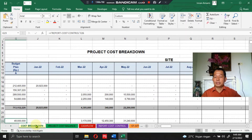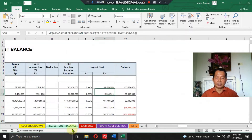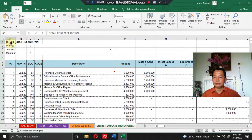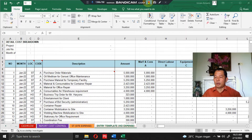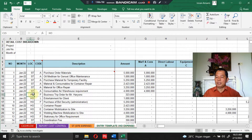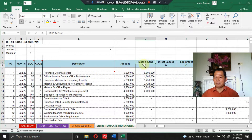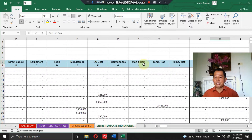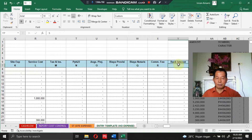Now we will check how to operate this program. To operate it, you only need to input all costs incurred during the project. Don't forget to complete each entry with an order number, month of transaction, and project cost location in the form of a letter — starting from A for material and consumable, B for direct labor, C for equipment, and so on until S which stands for bank interest.